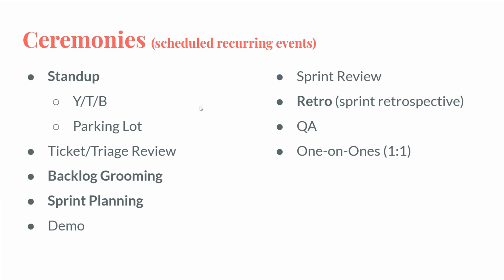Sprint planning is exactly what it sounds like. It is when you are going to plan out the next iteration of time. So the next 1 week sprint or the next 2 week sprint, or 3 or 6 or whatever. Like I said, most places do 2 week sprints. If it's a brand new team where nobody's really worked with each other before, it's pretty common to do 1 week sprints for a few months to kind of get down a good idea of a cycle with everybody and understand where we're at, and to rapidly iterate on how the team dynamic works and what you work on as a team. But after that period of time, it's really common to switch over to a 2 week sprint.